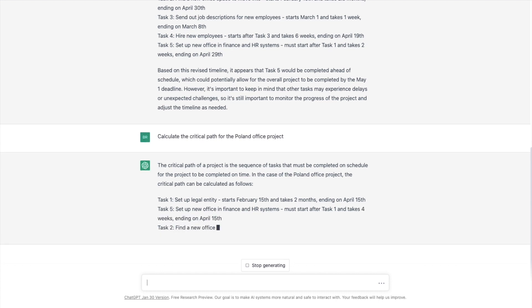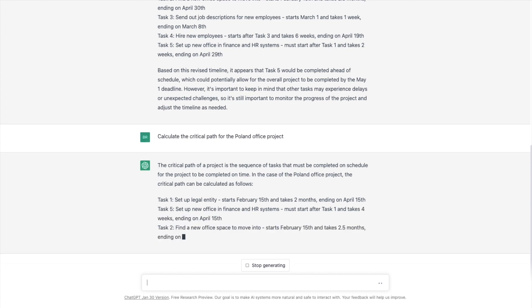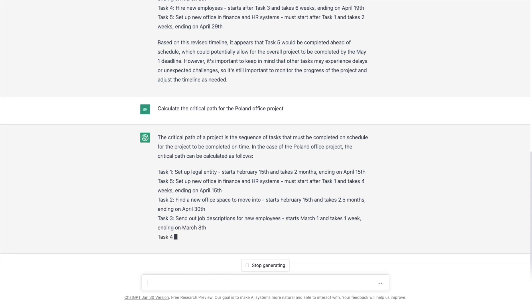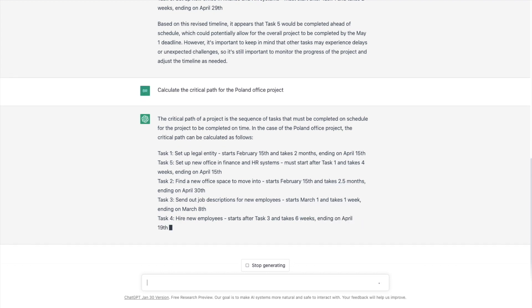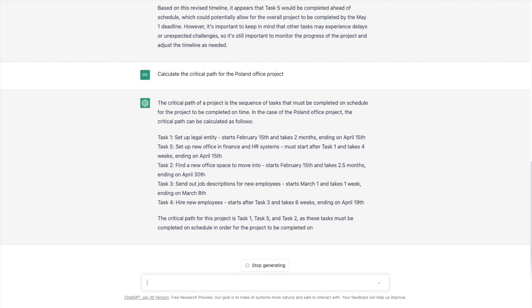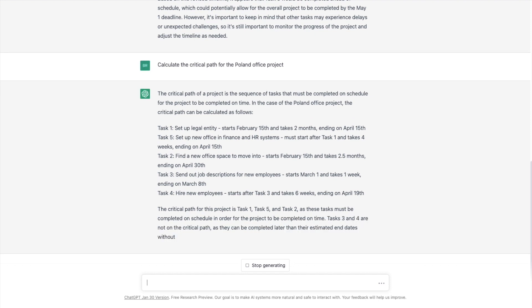So task one, task five and task two. Okay. So it's telling us task one, five and two are the critical paths. These have to be completed on schedule in order for the project to be completed on time. Three and four are not on the critical path. Okay. I think that that's pretty smart. I love the intelligence of that. Now I don't think it's realistic to take an entire, you know, a hundred line Gantt style list of tasks and put them into this though. You probably could, maybe I'll try that in a different video, but just based on these five simple tasks and the sequencing and the dependencies, it's done really quite an admirable job. I am impressed by ChatGPT and what it's able to do for projects. I hope you found this interesting and I hope you're finding ways to incorporate ChatGPT into your project practice.